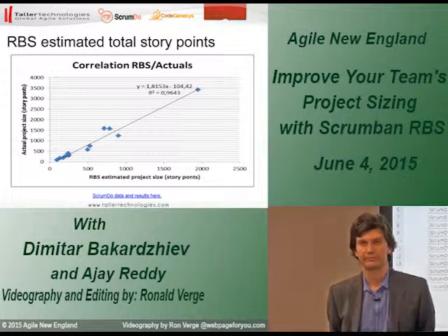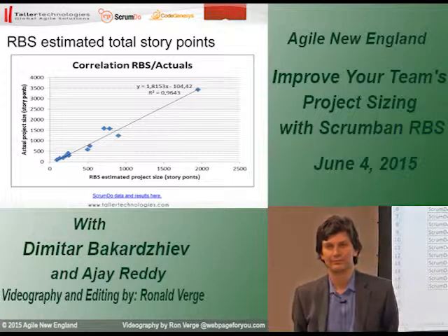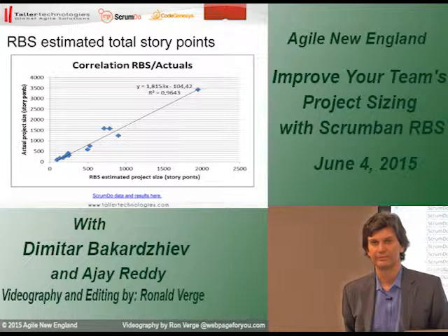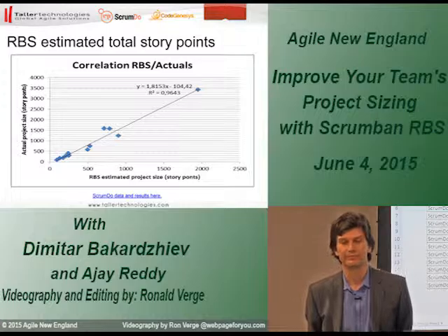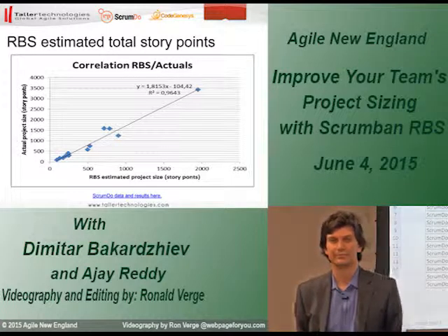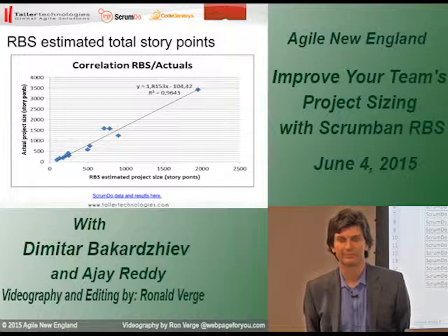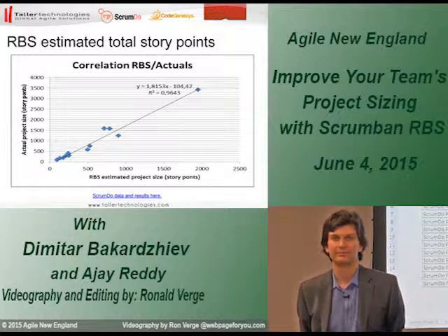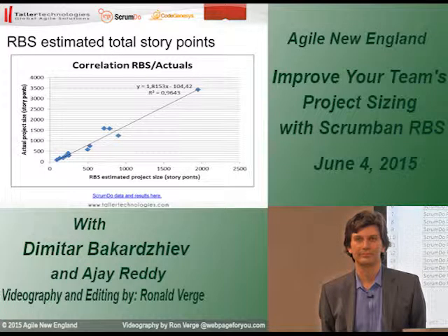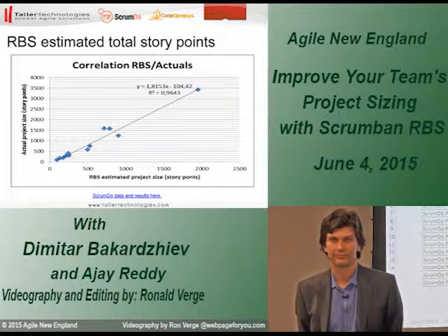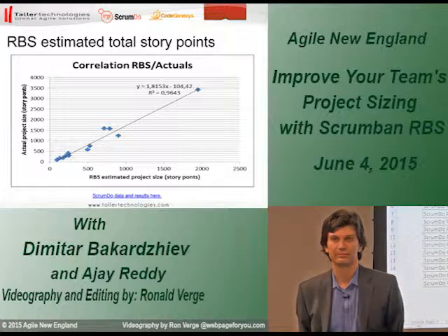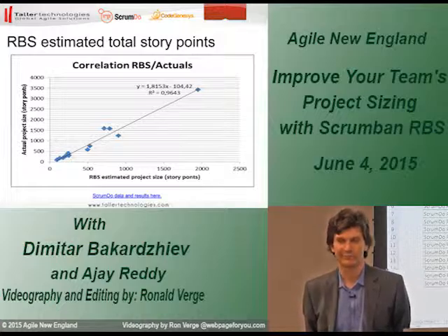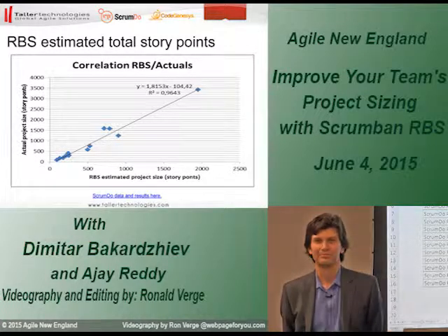You take RBS, and all that's really allowing us to do is take a look at the input, but not have to do a deep dive on everything. All you really have to do is, with the same set of minds as always, define a set of epics as they have been all along, and only drill down into those enough to get a decent sample and create a reasonable estimate. But what you can't allow is a company to come along and say, here's a new project team, I need you to go off and give me an estimate. You can try it, but you're not going to have a very high confidence level.